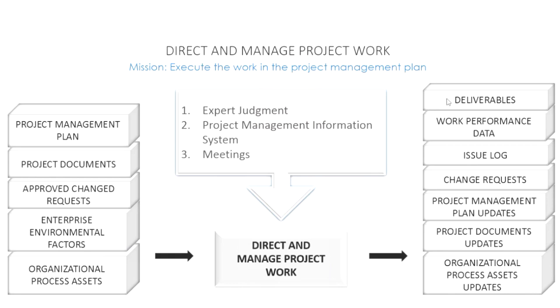Deliverables. Where do deliverables go? After we get a deliverable, what happens to it? It becomes an input to something else. One place that deliverables go is the control quality process. But you really need to go through the other areas where we find deliverables. We find them in a couple of other areas as inputs.